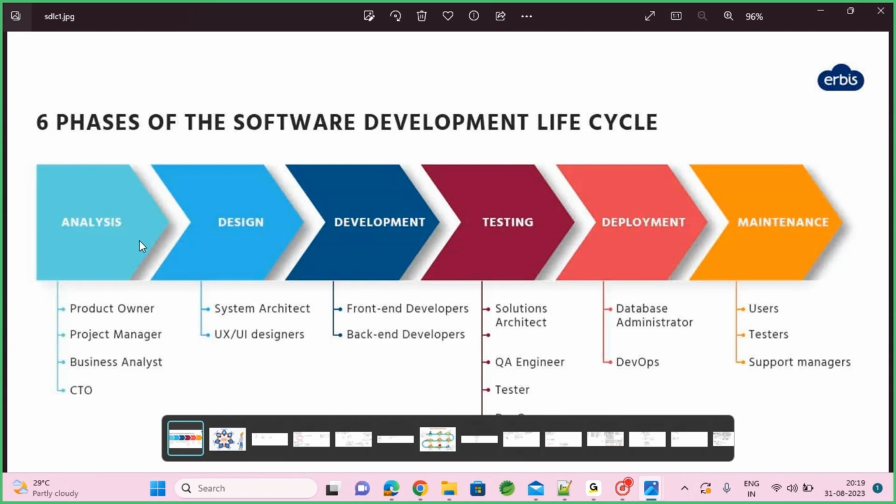Here you need a different set of people for this project. You need to hire one BA, whose job will finish by this analysis phase. So will you hire the BA for 3 months? No, you need to hire him and keep him. Even if you don't have work, you need to pay him. Until this BA completes the analysis phase, you will not be hiring any development team.